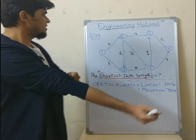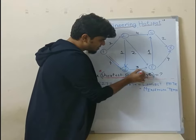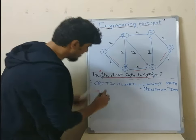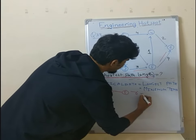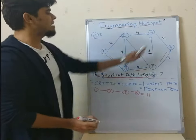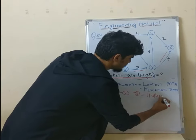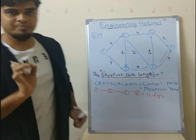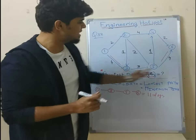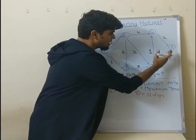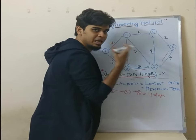The critical path, the longest path is 4 plus 3 plus 4, so either critical path 1-3-5-6 which is equal to 11. Now 11, if you think about 11 days, this project's longest path is 11 days. Critical path is 11 days. If we follow this path, then all our activities are in 11 days.